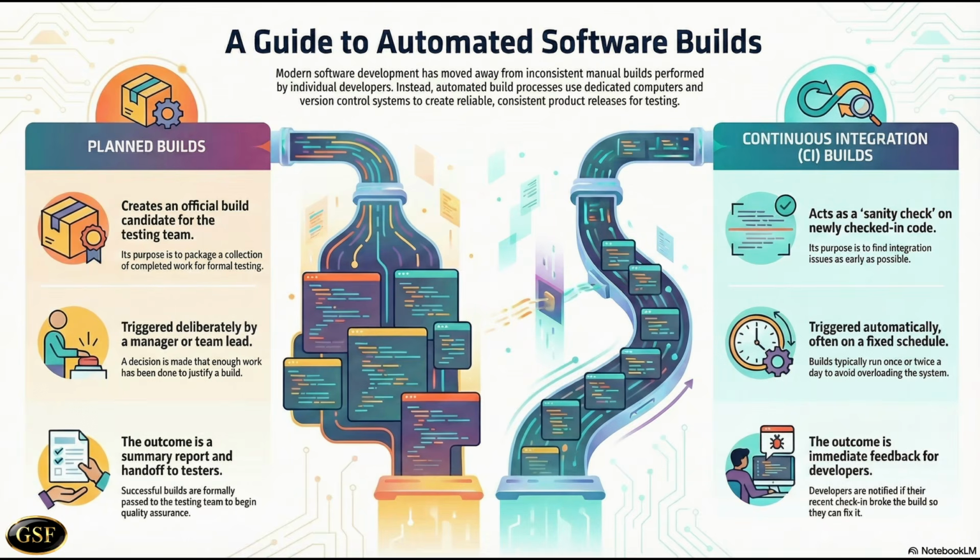The requirements management system holds a list of all the items for the product's deliverables, and which have been marked as development complete. This allows a report to be generated listing all the items that could be in a build and the associated files. This report will allow the team leaders, Scrum Masters and Project Managers to determine if enough work has been done to justify a build candidate.